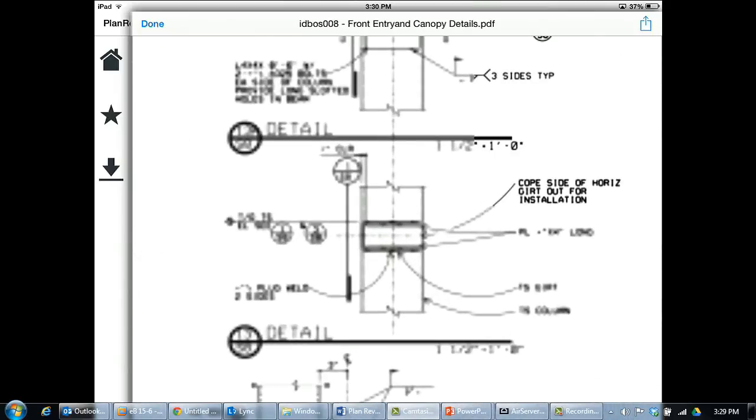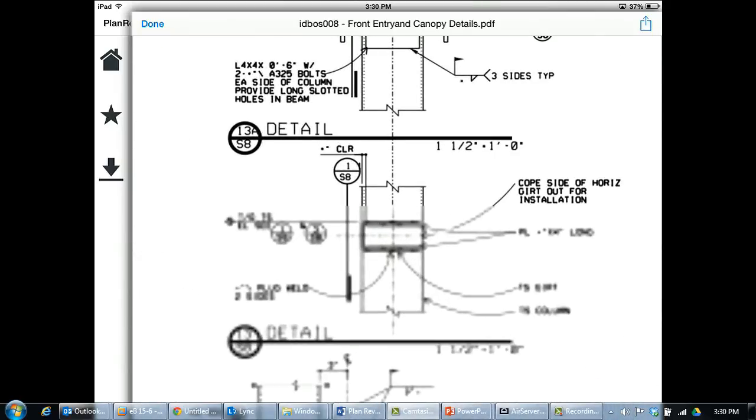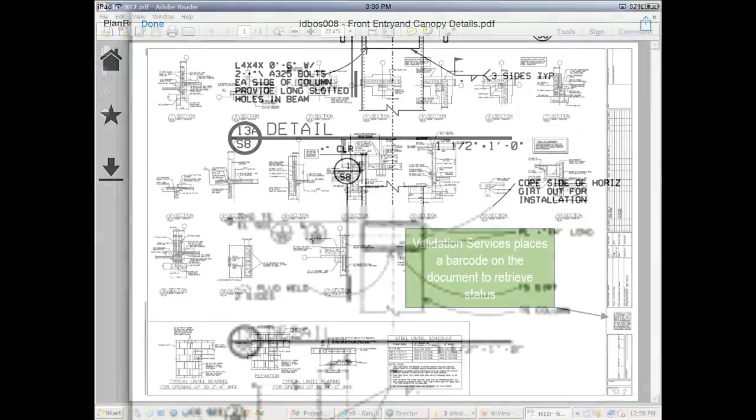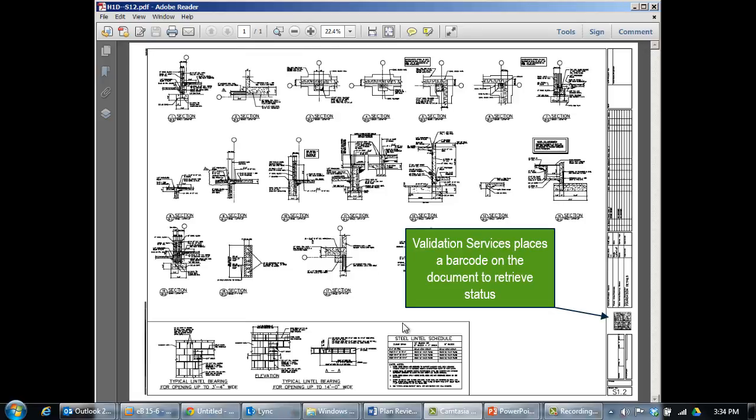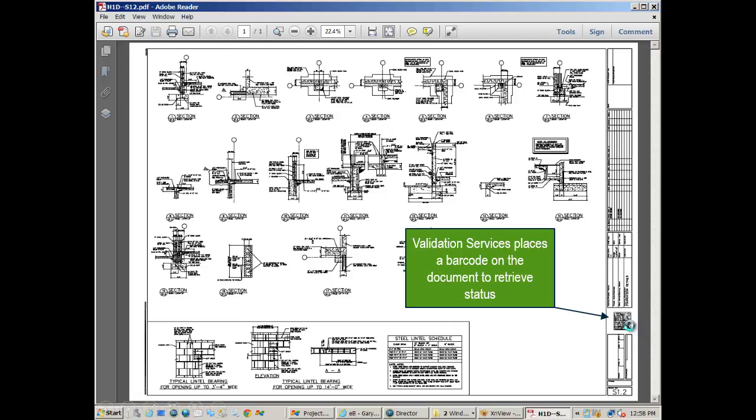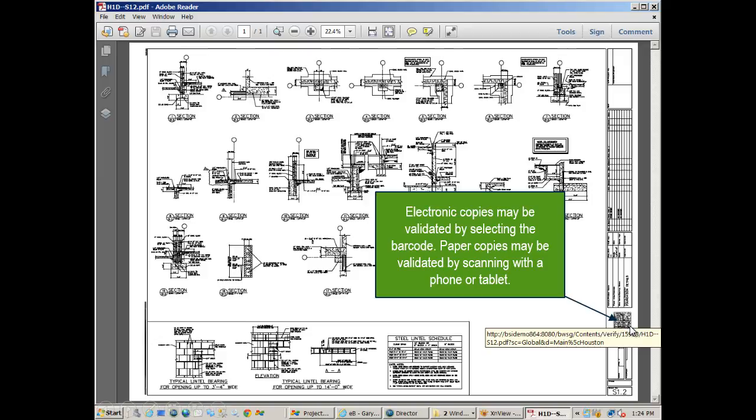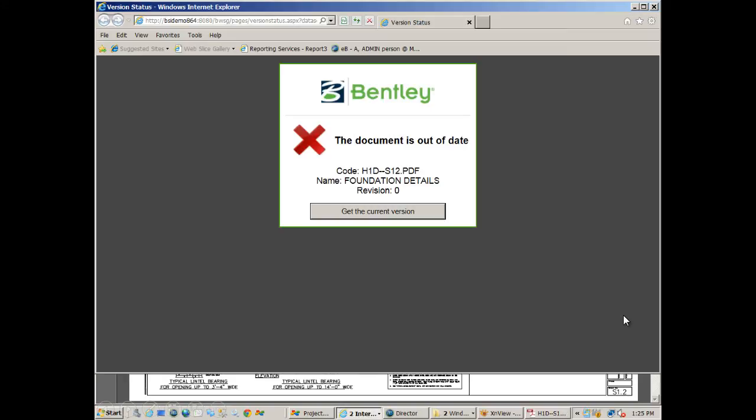Another capability we add is to verify that drawings are on-site or the latest approved plans. Once plans are approved, we can render a barcode onto the plans. That barcode can then be scanned with a mobile device, which will call the EB Information Manager Document Validation Service, and verify if it is the latest approved version. Making confirming what is in the field and what is approved very quick and easy.